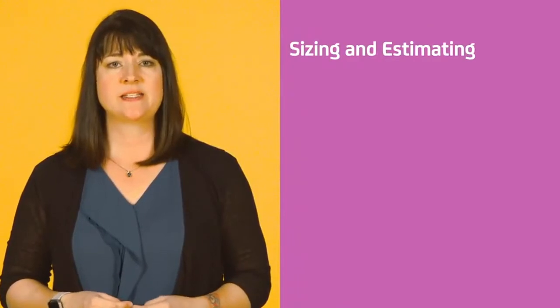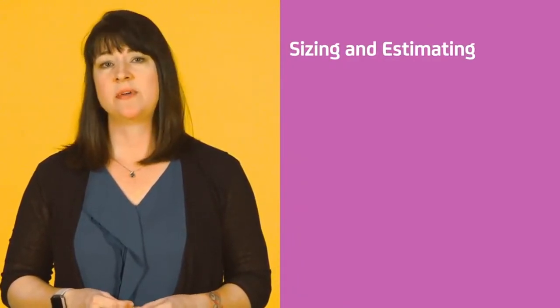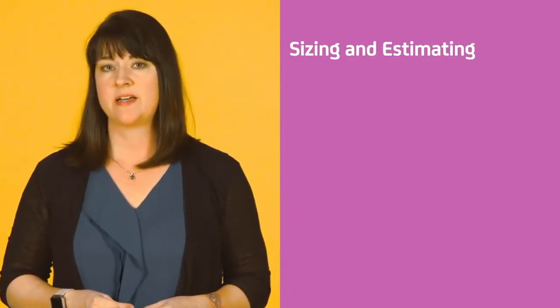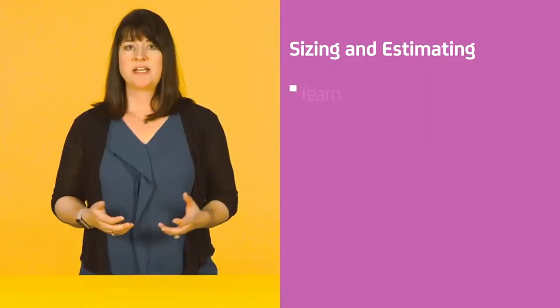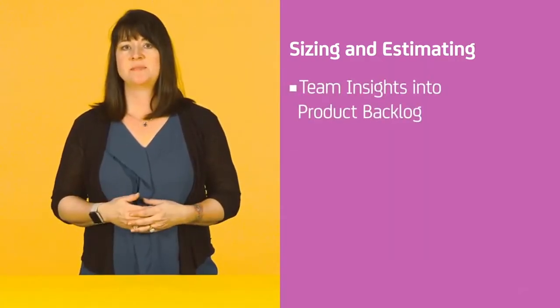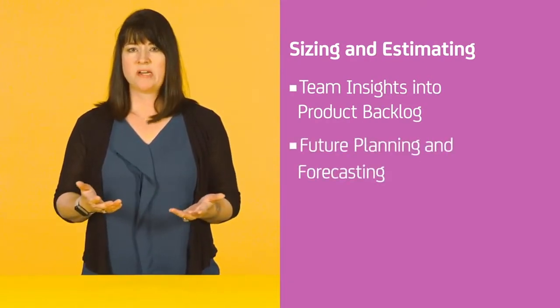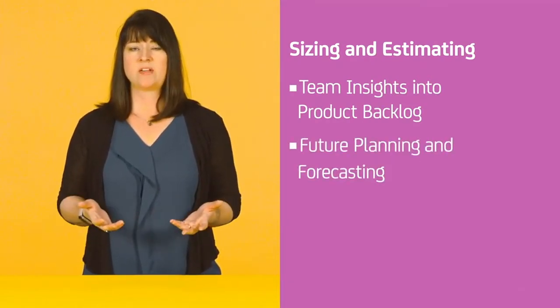Agile teams plan the work they believe can be done within each iteration based on the highest value features. When it's time to start planning your iterations, an important task called sizing and estimating is used to determine the amount of work your team can realistically accomplish. Sizing and estimating are both ways of gathering team insights into the effort of items in the product backlog, and these insights inform the product owner on how to rank the product backlog.